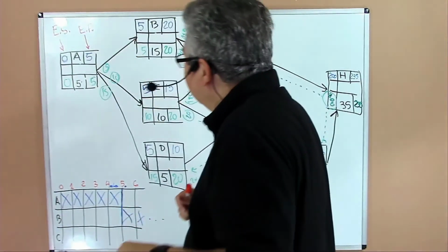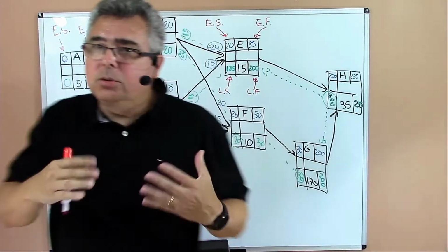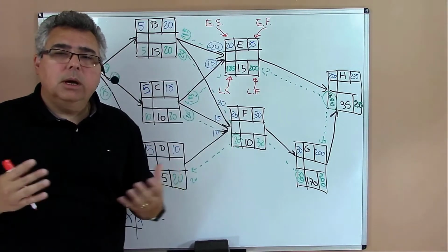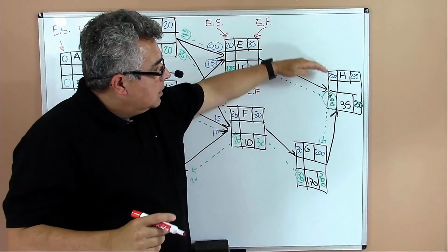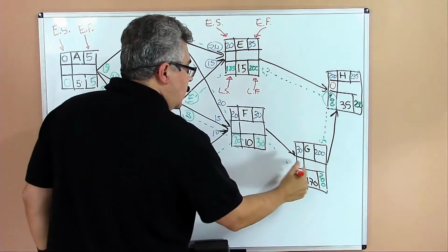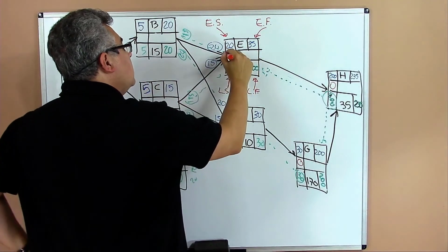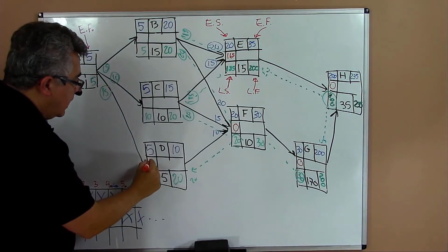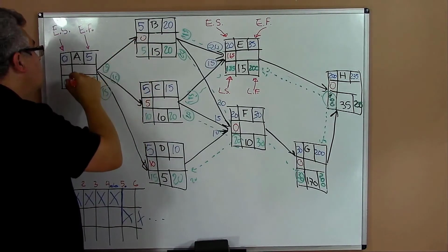I know that. Okay. And now let's explore all the data that we got from that computation. We can now subtract the early times from the late times. Like here, we have 0. Here, we have 0. Activity F, 0. Activity E, we have 165 days. Activity D, we have 10. Activity C, we have 5. And activity B and A, 0 and 0.